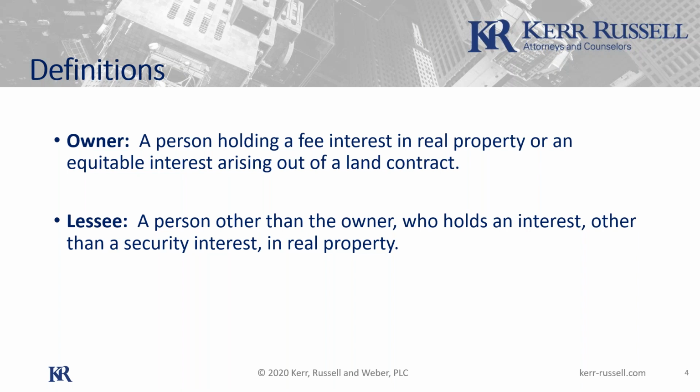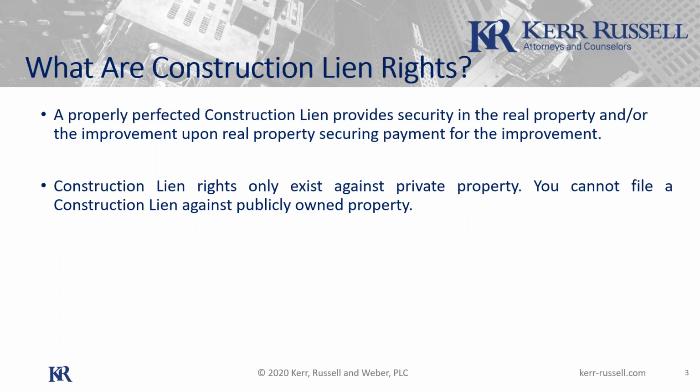But back to my point, your rights versus the customer never go away. You always are able to pursue them. So let me illustrate that point by trying to share with you what the suit would look like if you had to begin foreclosure of the lien. So I'm jumping ahead. You've had problems with your customer. You're not getting paid. You decide to lien. Like I said, most times either the threat of the lien or the filing of the lien will lead to discussions that will hopefully get you paid. But in the odd time it doesn't, you need to decide whether to begin suit, and you only have 1 year to do that. Although most people who are unpaid for going on a year wouldn't wait any longer anyways.